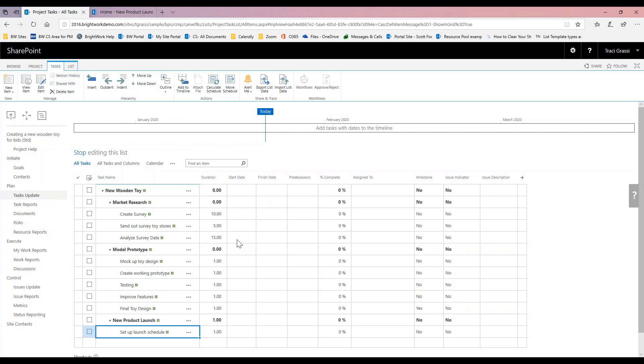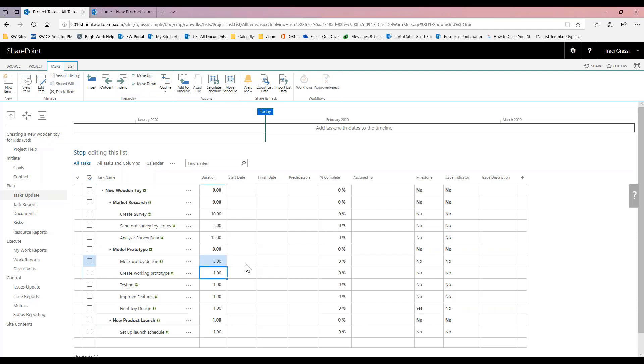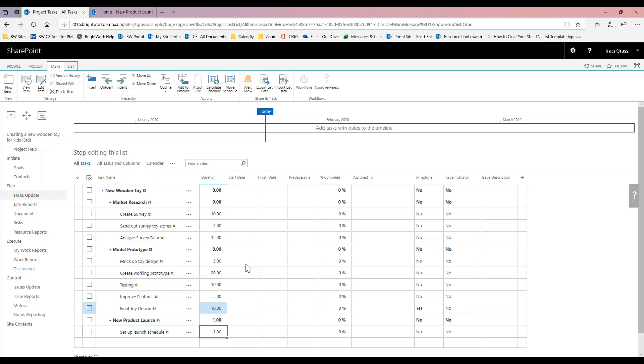Now that I've got my tasks in here, we need to set our durations. I'm going to say my mock-up toy design is going to take five days. Creating the prototype is going to be about 20 days. Our testing, we'll do that in 10 days. These are actually in days, so the duration is days just like it is in Microsoft Project.